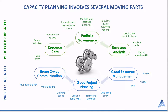This diagram highlights how capacity planning involves several moving parts. It begins with good project planning. It requires a project team to define the scope of their work, to define the tasks required to get the work done, or even a work breakdown structure. It requires estimating the duration of the work and then the relative effort needed. This is the foundation of resource management. At the portfolio level, we need a way of aggregating this, making it as easy as possible for leaders to review and make decisions.